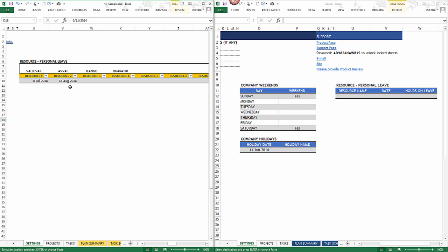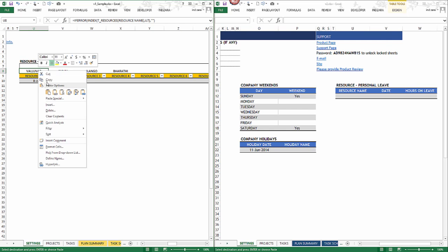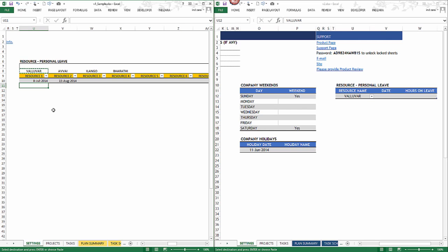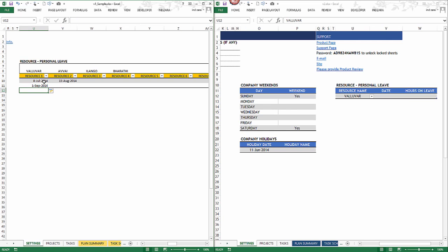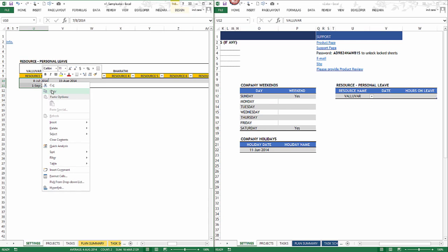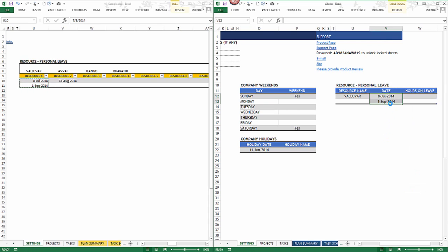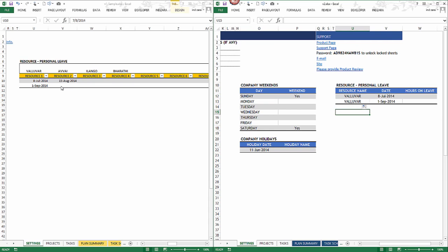One thing that is different is how the resource personal leave was set up in version 1 versus version 2 — this will require a little more work. Find the resource name first, paste as values. If a person has multiple dates — for example, they also have September 1st as personal leave — select both dates, Ctrl+C, come over to version 2, paste as values. You'll now have two rows, and you can easily drag and fill since it's the same resource taking two days off.